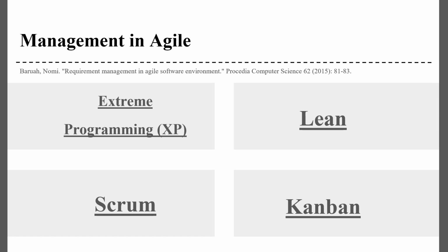Following, Lean software development stands out in its user requirements gathering method. Screens are presented to end users for direct input, aligning with the just-in-time production ideology. Small cards of stories initiated by the customer kickstart the process. Developers estimate implementation time, and the work organization transitions into a self-pulling system, fostering adaptability through stand-up meetings.